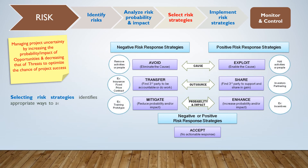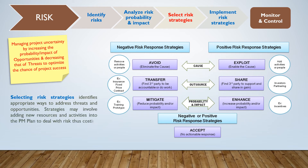Selecting risk strategies identifies appropriate ways to address threats and opportunities. Strategies may involve adding new resources and activities into the project management plan to deal with risk, thus costing money or impacting the schedule. Contingency plans may also be created in case certain risk events occur.